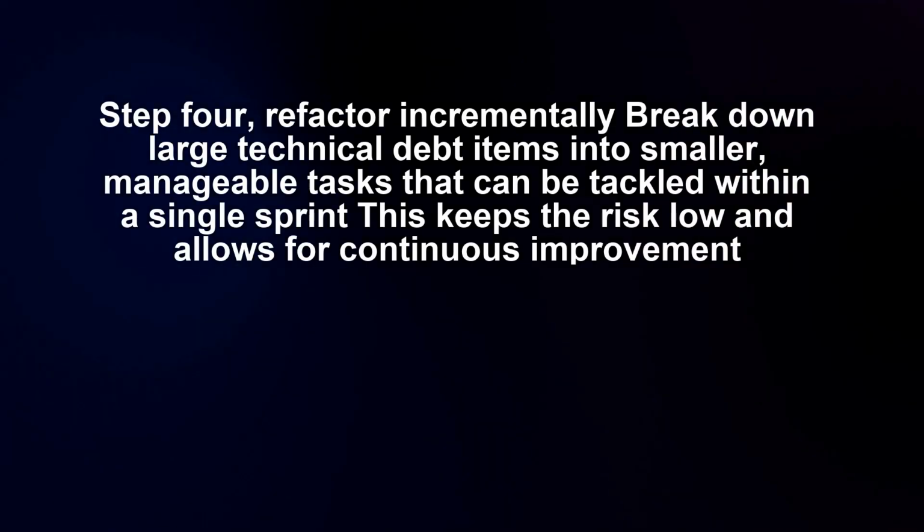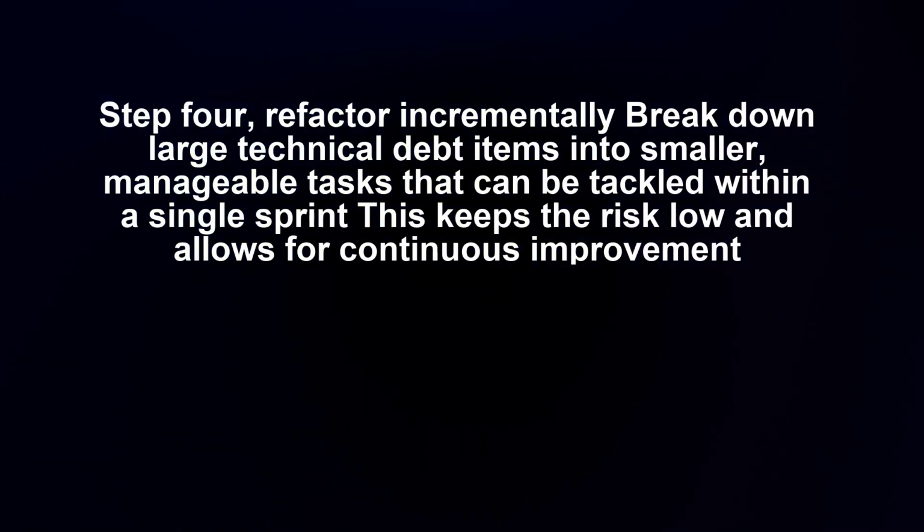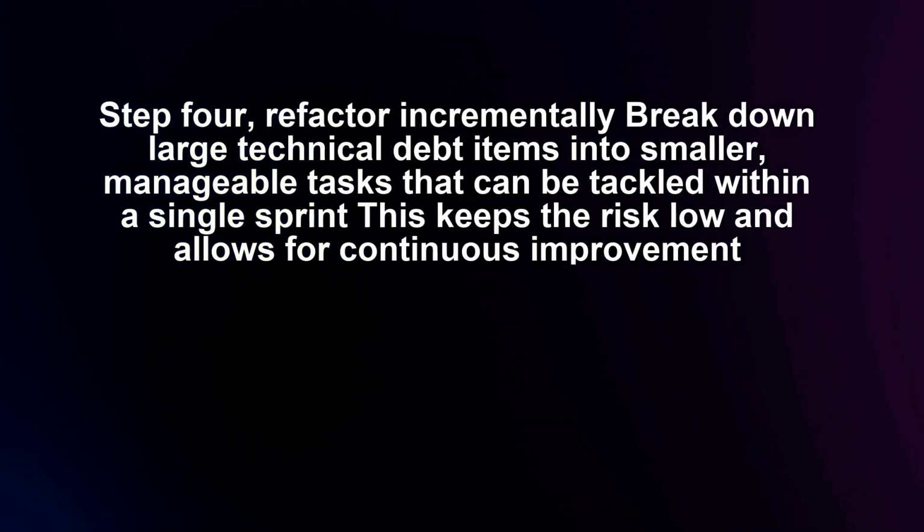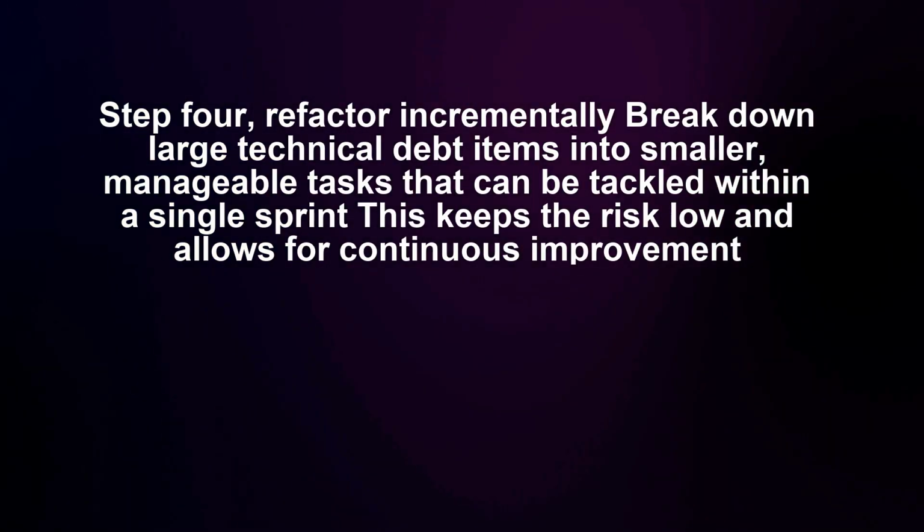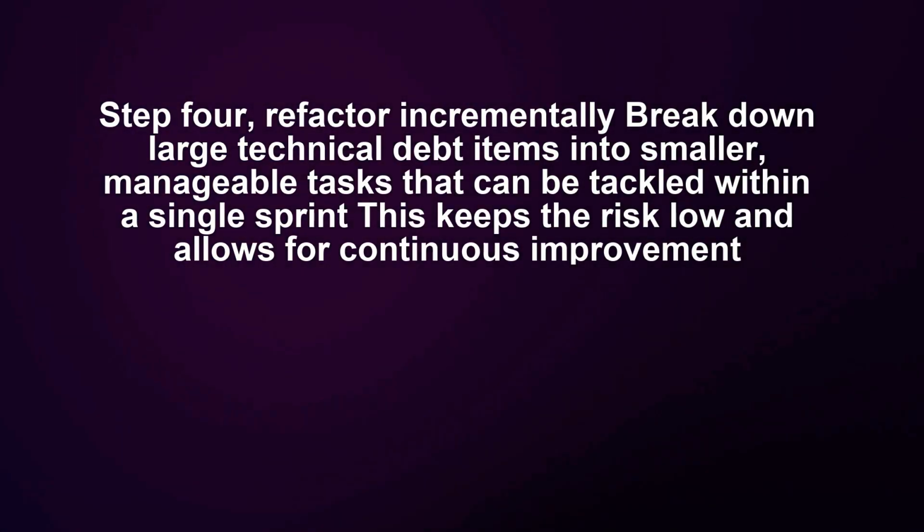Step 4. Refactor incrementally. Break down large technical debt items into smaller, manageable tasks that can be tackled within a single sprint. This keeps the risk low and allows for continuous improvement.